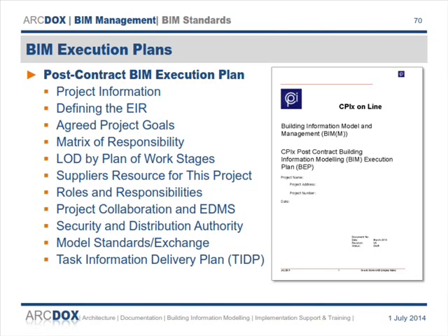At post-tender, that gets handed over to the main contractor, who's told, there's the design intent model. You need to develop that over the course of the next 16 months or whatever it is, with your subcontractors, and give us back an as-built, verified model for the building.